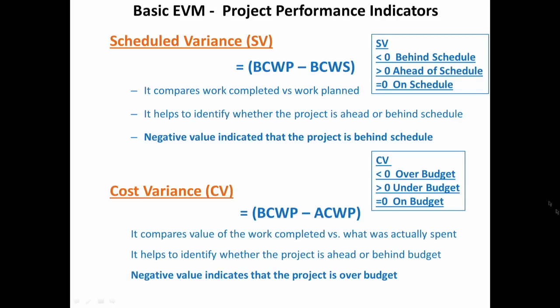Based on BCWP and BCWS, we get the schedule variance. These are the project performance indicators. BCWP minus BCWS gives schedule variance: if less than 0 it is behind schedule, more than 0 it is ahead of schedule, and if equal to 0 the project is on schedule.